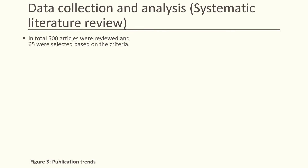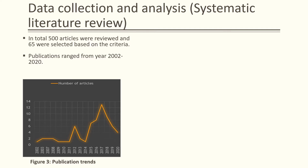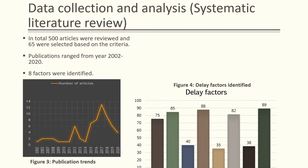One of the methods used for data collection is the systematic literature review. During the systematic literature review, approximately 500 international articles were reviewed, but only 65 articles were selected based on the literature quality criteria. Figure 3 presents the publication trend on the research topic ranging from 2002 to 2020. It was noticed that researchers are more inclined toward this research topic in the current decade compared to the previous decade. Based on the systematic literature review, eight common themes were identified: design error, labor shortage, equipment shortage, events, weather, geotechnical error, breakdown, and material shortage, as shown in Figure 4.